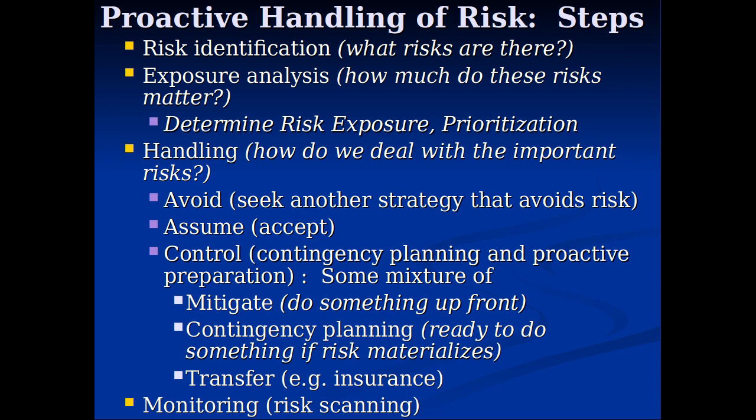So that's mitigation. Contingency planning is different. Mark my words. These are the two things. These are eminently examinable. Put gold stars next to them. I'd be surprised if the final exam does not ask about this. Okay? So mitigation, you try to avoid it happening, or you try to make it less impactful if it does happen. The point is you're investing now to make it less of a problem. You're taking action now. Contingency planning is different. All you're doing is putting in place a plan now. You're planning what you will do if it comes about.